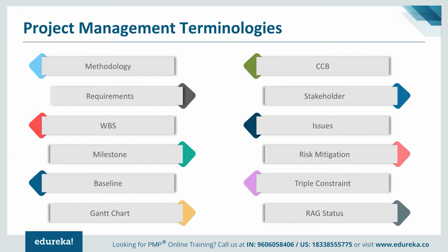Another topic is CCB, which is Change Control Board. I mentioned to you about requirements gathering and baselining. So the Change Control Board comes into the picture whenever you're doing anything beyond the baseline. If a requirement is baselined and now a change is introduced in the project, then it has to go through a change control board. In the change control board, you will have various stakeholders. Of course, you'll have a project sponsor, you will have the requester of the change, and then you will have representation from the IT side as well.